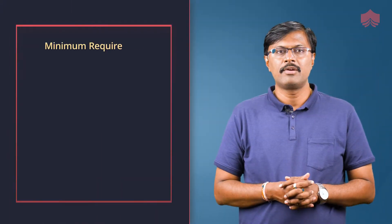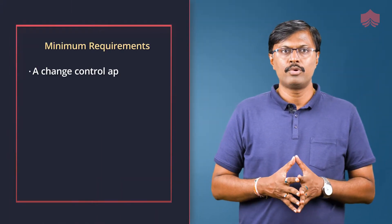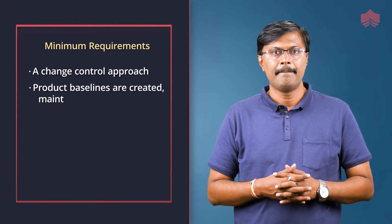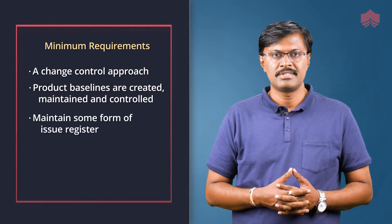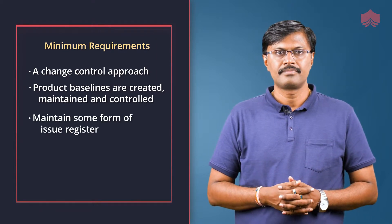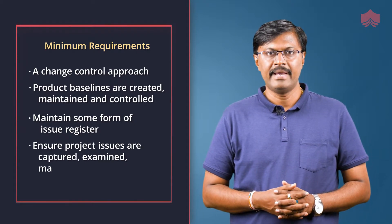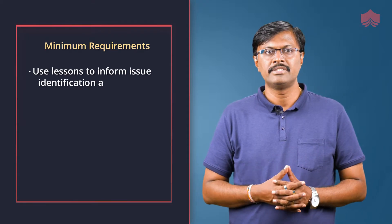PRINCE2 minimum requirements are: define a change control approach; define how product baselines are created, maintained and controlled; maintain some form of issue register; ensure project issues are captured, examined, managed and reviewed; use lessons to inform issue identification and management; and maintain the issue register and change control approach.